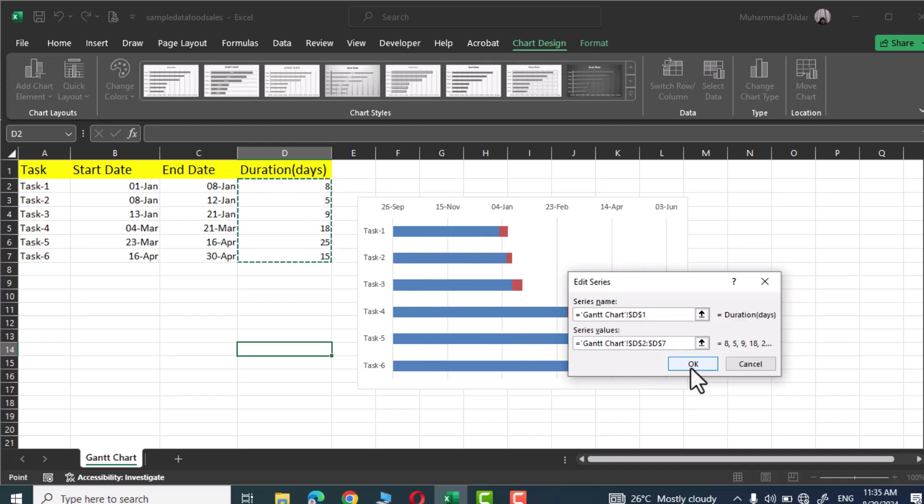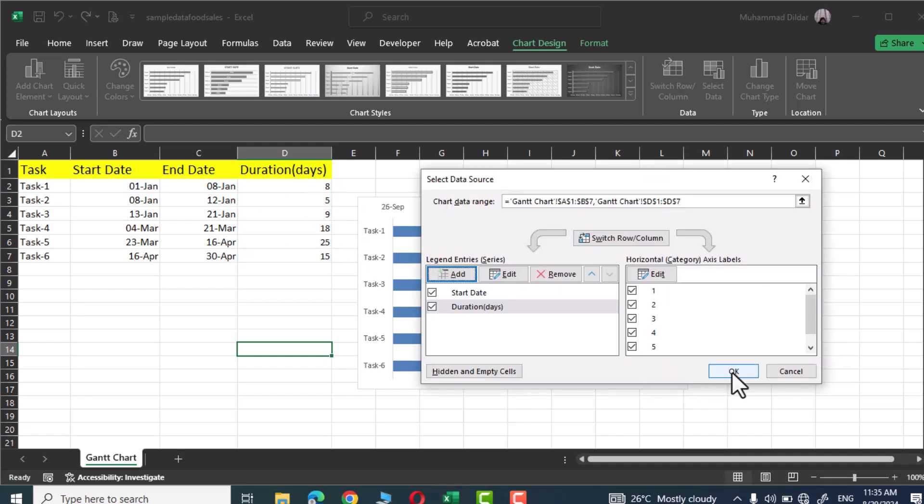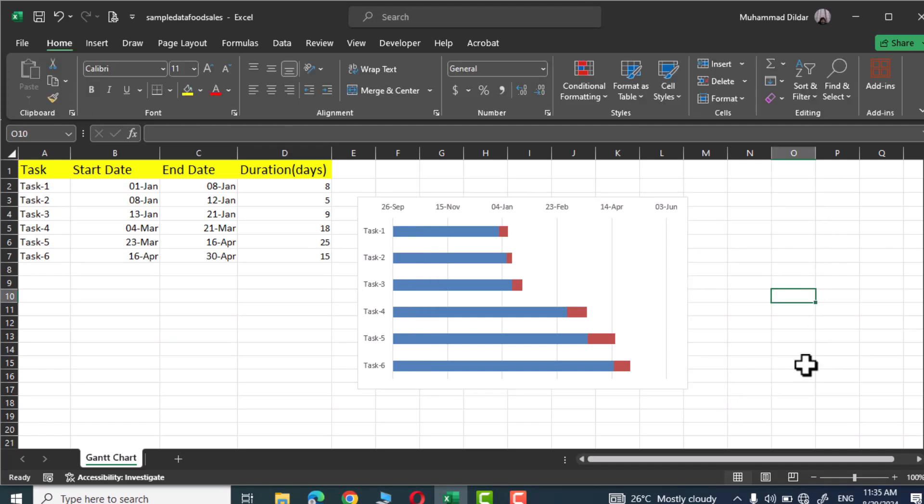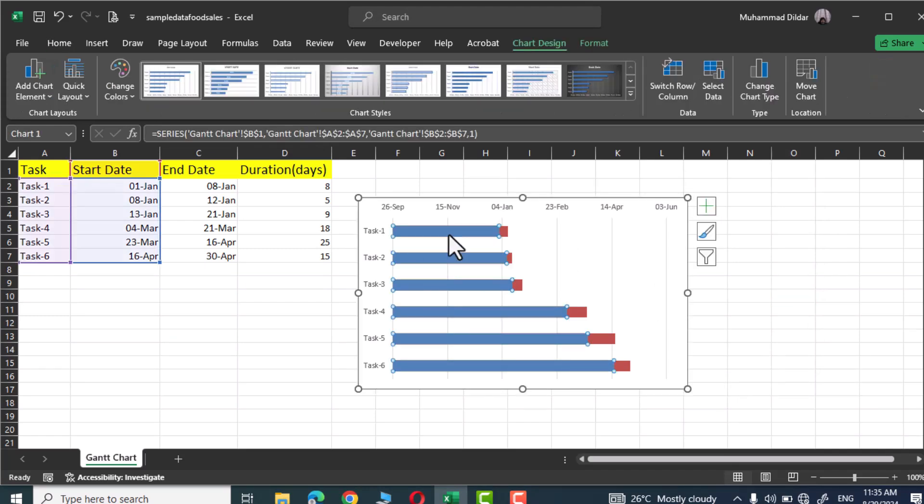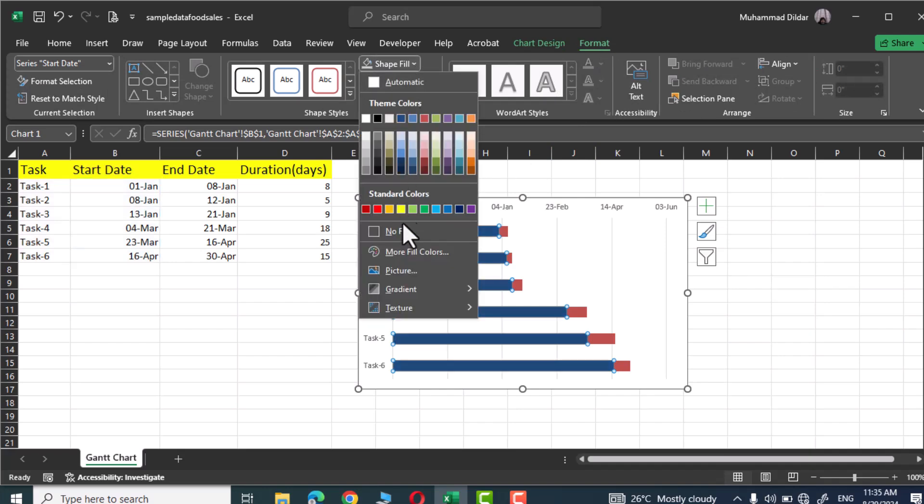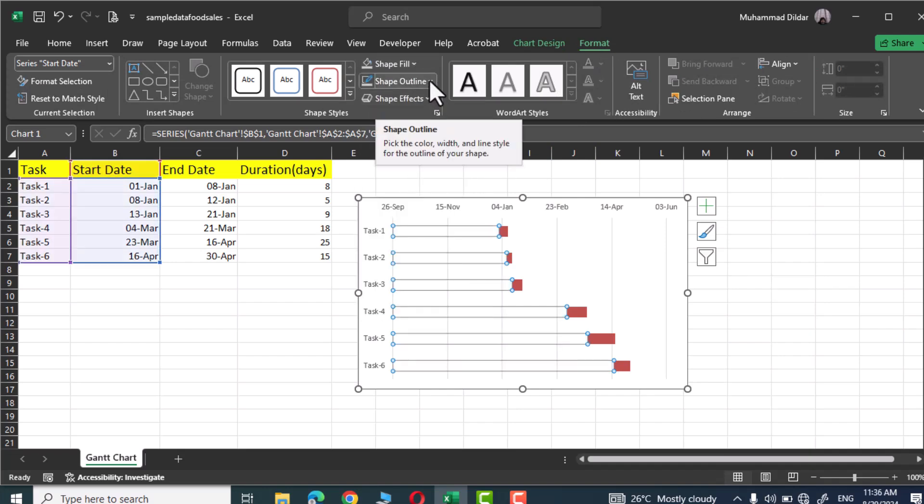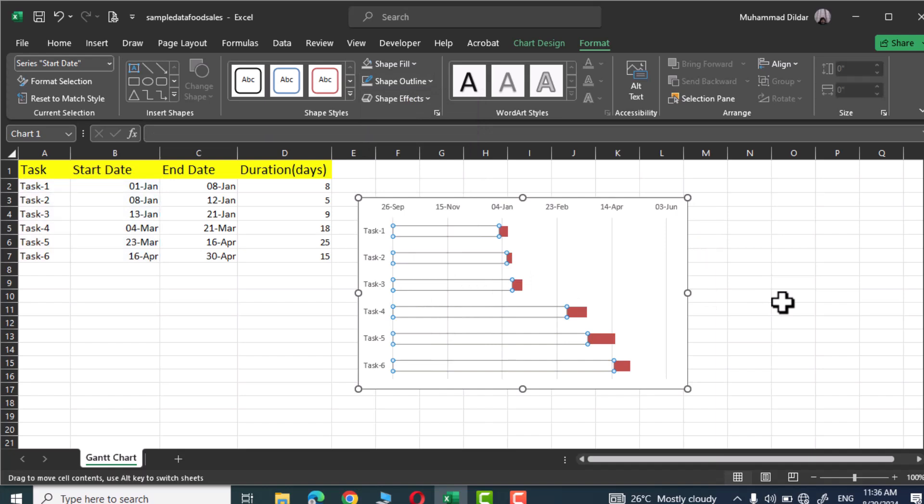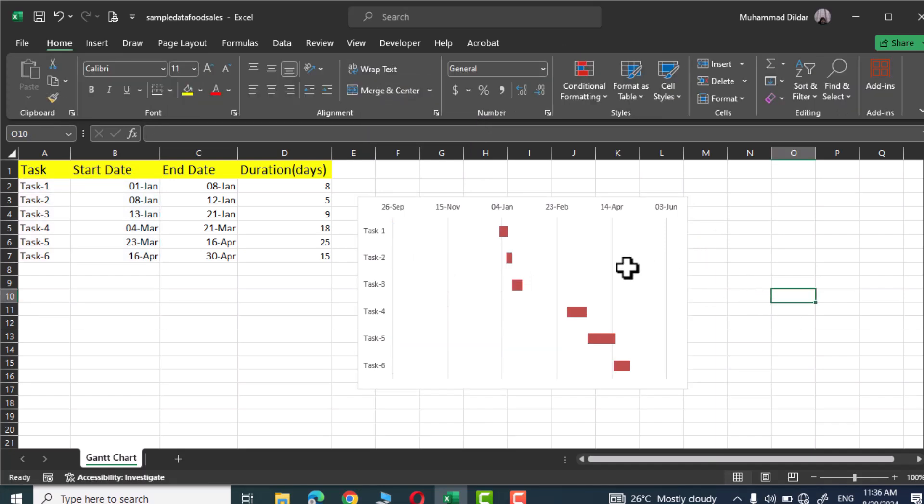Next click on these bars, go to format option, shape fill, and choose no fill. Similarly go to shape outline and no outline. Click outside and there you see the initial look of our Gantt chart which needs to be refined a bit further.